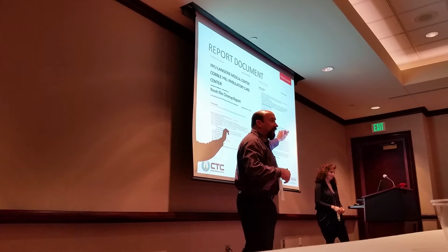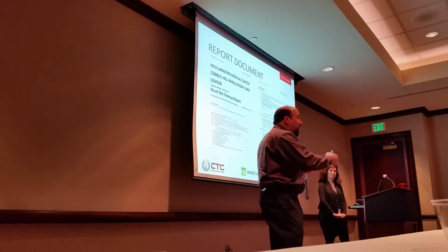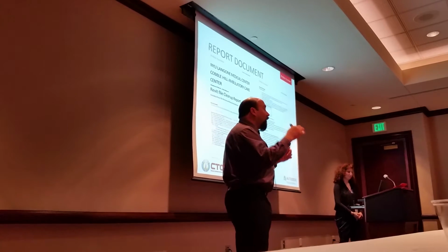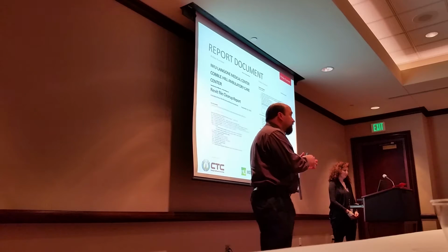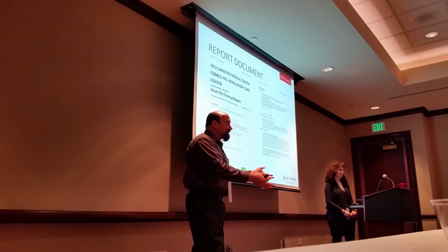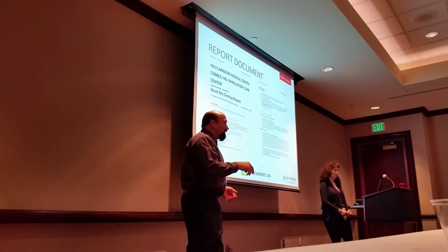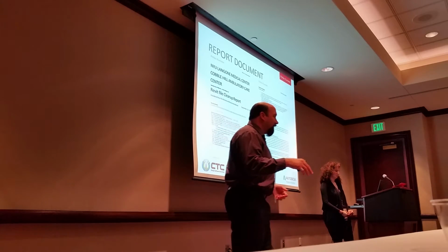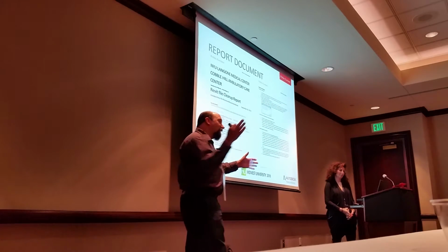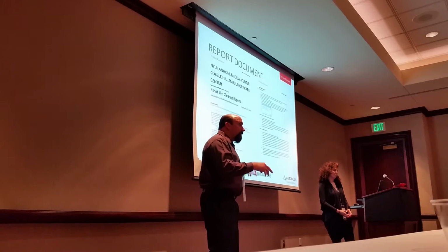And at a PM level, an office manager level, a leadership level, we talk to the hours that staff are spending waiting to access the files. You've got 10 or 14 people working on this file and it takes a half an hour to open. You open it at least once a day, and you have this time period for saving times 14. That's simple math. You've got X number of hours. If I can cut that in half or better by improving the quality of the file, that's savings.